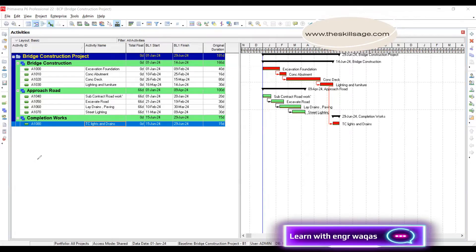Here is our simple project scenario: a bridge construction divided into four activities — excavation foundations, concrete abutment, concrete deck, and lighting and furniture — plus an approach road with excavation, road lead, rain paving, street lighting, and completion. The assumption is that the contractor is an expert in bridge construction but needs to subcontract the approach road works, so there is a 'subcontract road work' activity included.